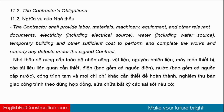The contractor shall provide labor, materials, machinery, equipment, and other relevant documents, electricity including electrical source, water including water source, temporary buildings, and other sufficient resources to perform and complete the works and remedy anything fixed under the site contract.